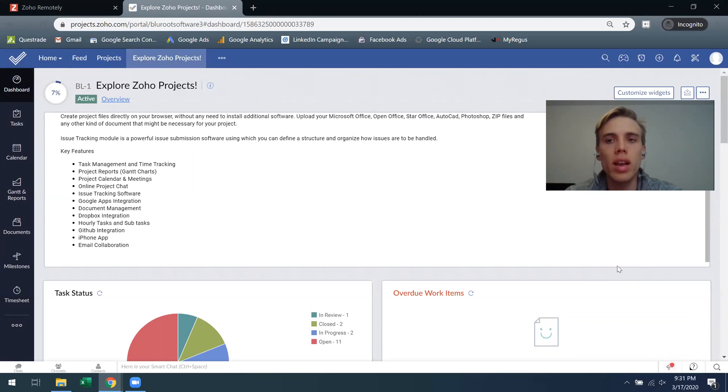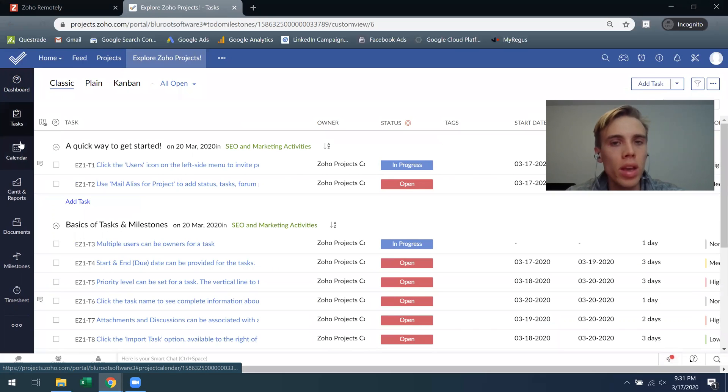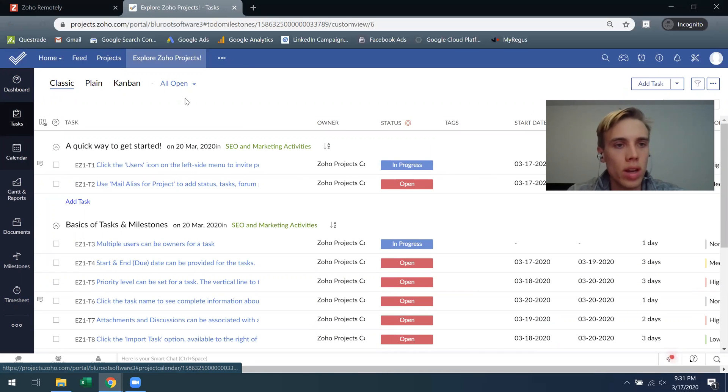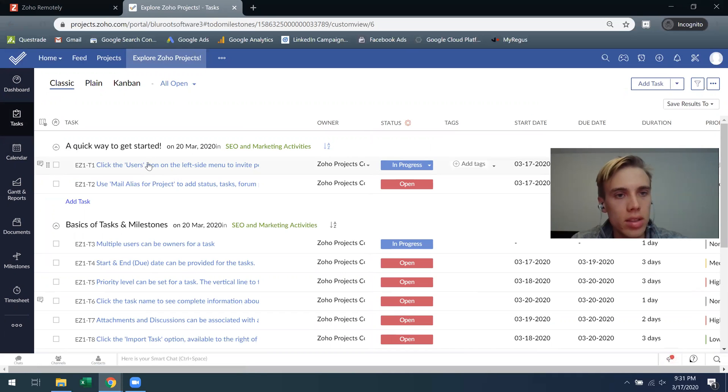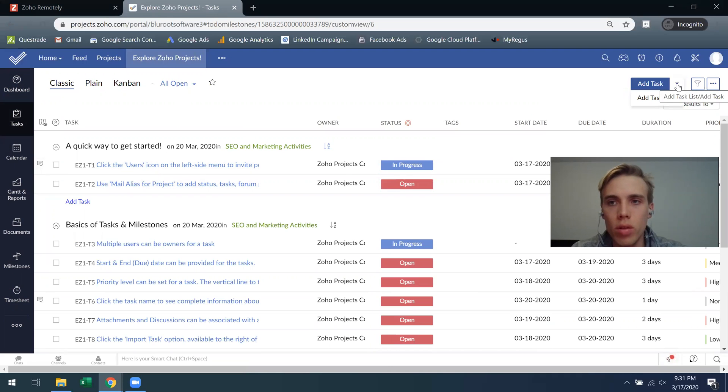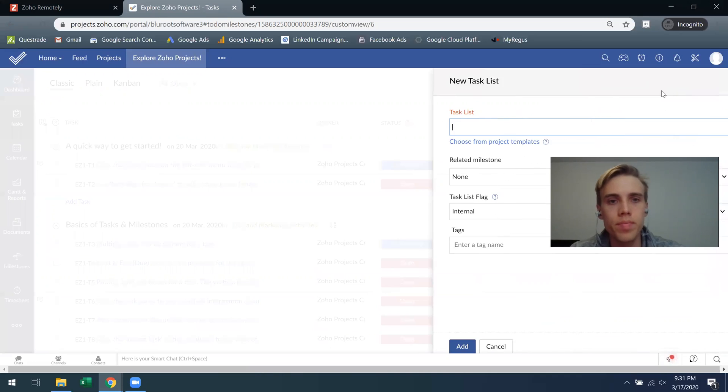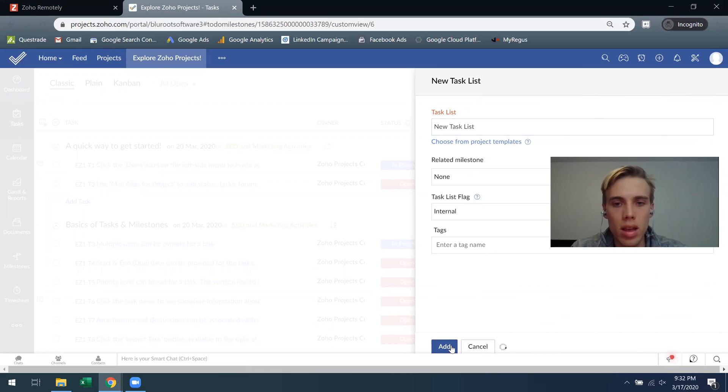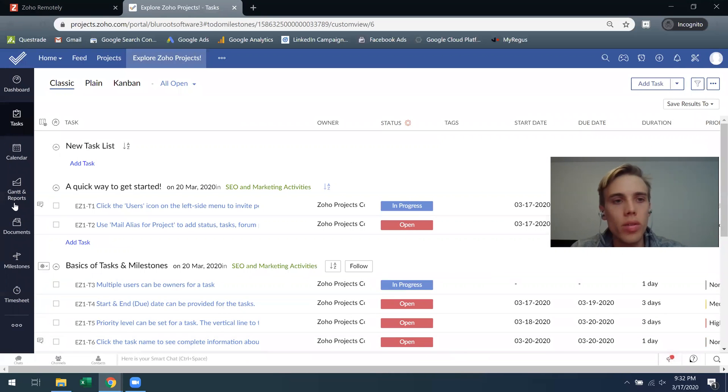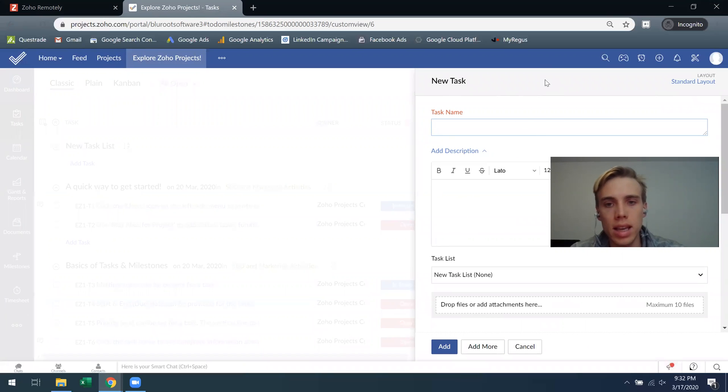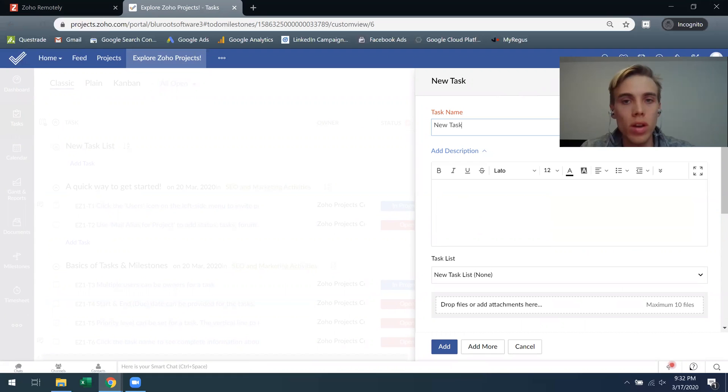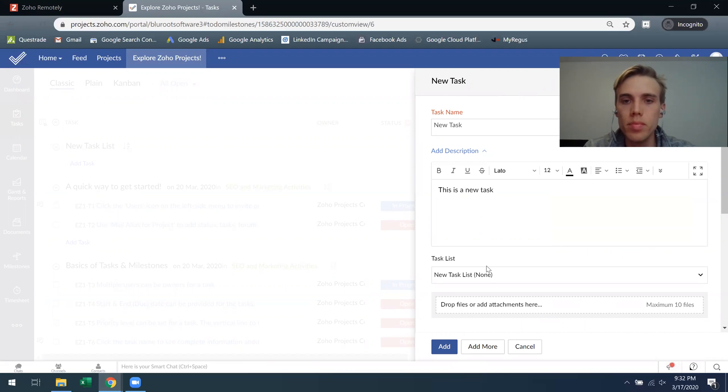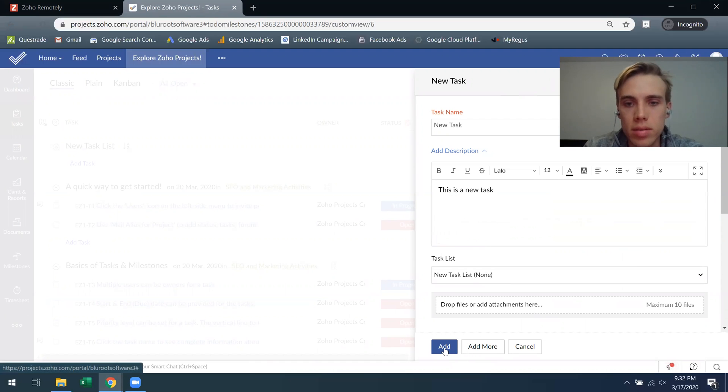So the underlying thing of Zoho Projects is the task. Let's click on tasks as an example. This is the classic view and how tasks are organized. This is what's called the task list and then these are tasks. If you want to create a task list you just hover over this drop down, add a task list and say new task list. If I wanted to add a new task I could do it right here or in the top right corner. I'll say new task, it'll ask me for a description, so this is a new task, and which task list it should be part of. I'll put it as part of this new task list.